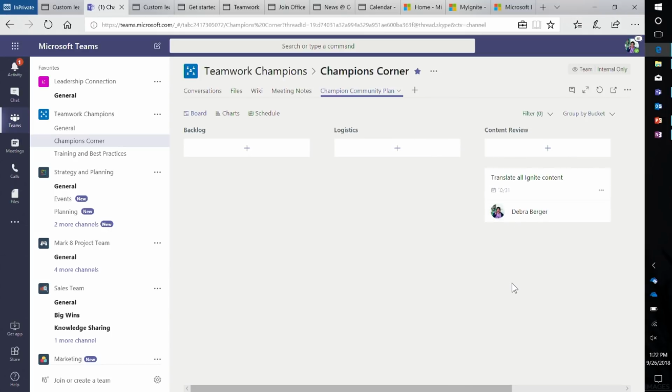So the idea is you have a bunch of ideas here, a bunch of tasks. You can move them into these buckets. The buckets should be the work streams of your project. If your project's simpler and you don't need to do it that way, you can have these buckets be people's names, or regions. You can organize your work any way that actually works for you.